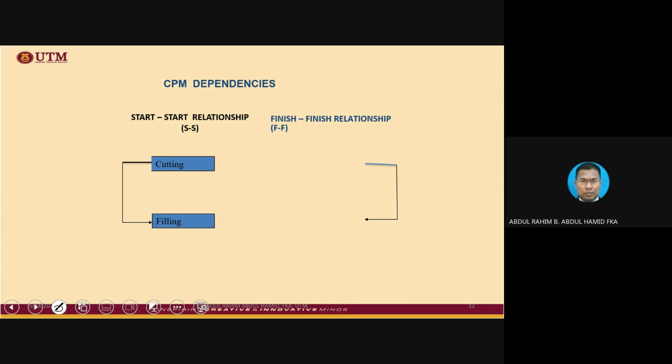On the other way around, cutting and filling also can be connected finish to finish, the same activity. So what is the difference between start to start and finish to finish? Because the activity looks the same. Well, this is just to emphasize which one is more important. Is it the starting of such activity or the ending? There are some activities connected together, for instance, cutting and filling.